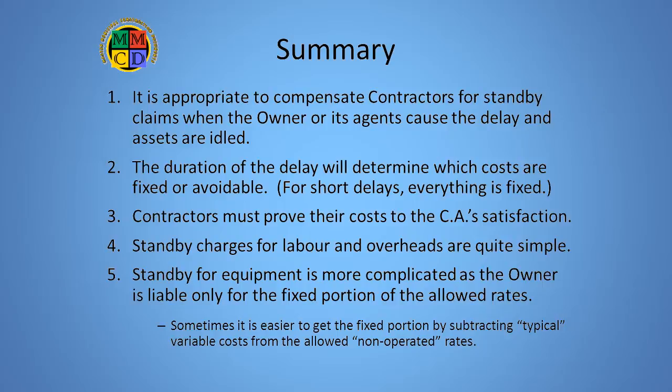Number four, standby charges for labor and overheads are quite simple, just provable costs for truly idle assets and allowable markups. Standby for equipment is more complicated, as the owner is liable only for the fixed portion of the allowable rates. And sometimes it's easier to get the fixed portion by subtracting typical variable costs from the allowed non-operated rates.